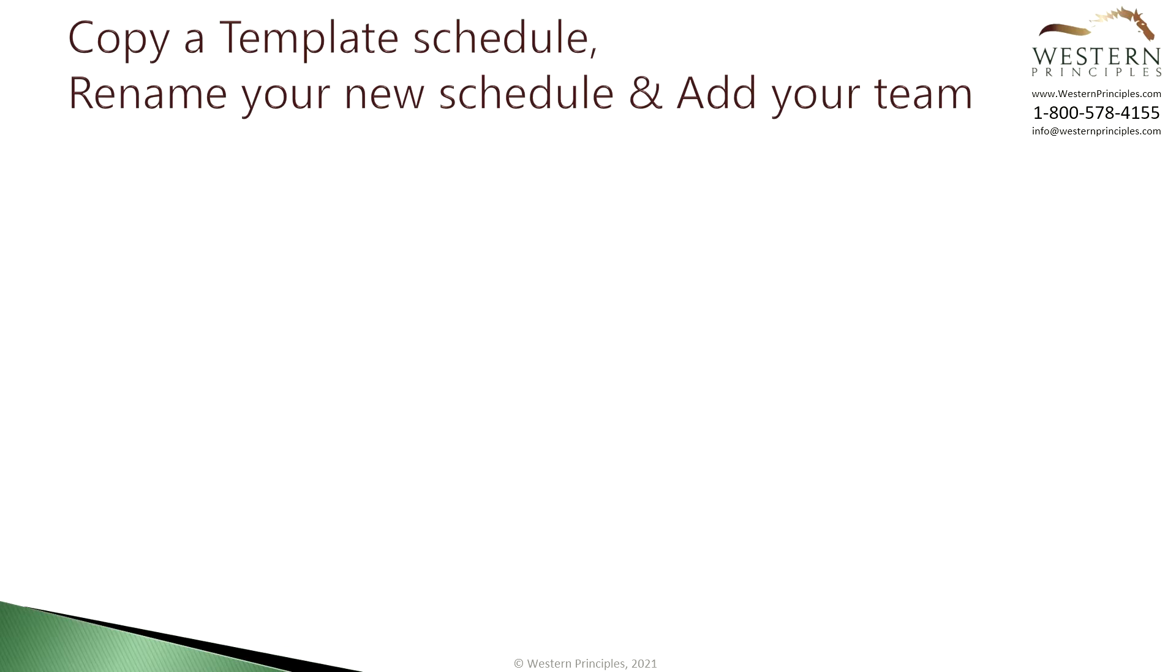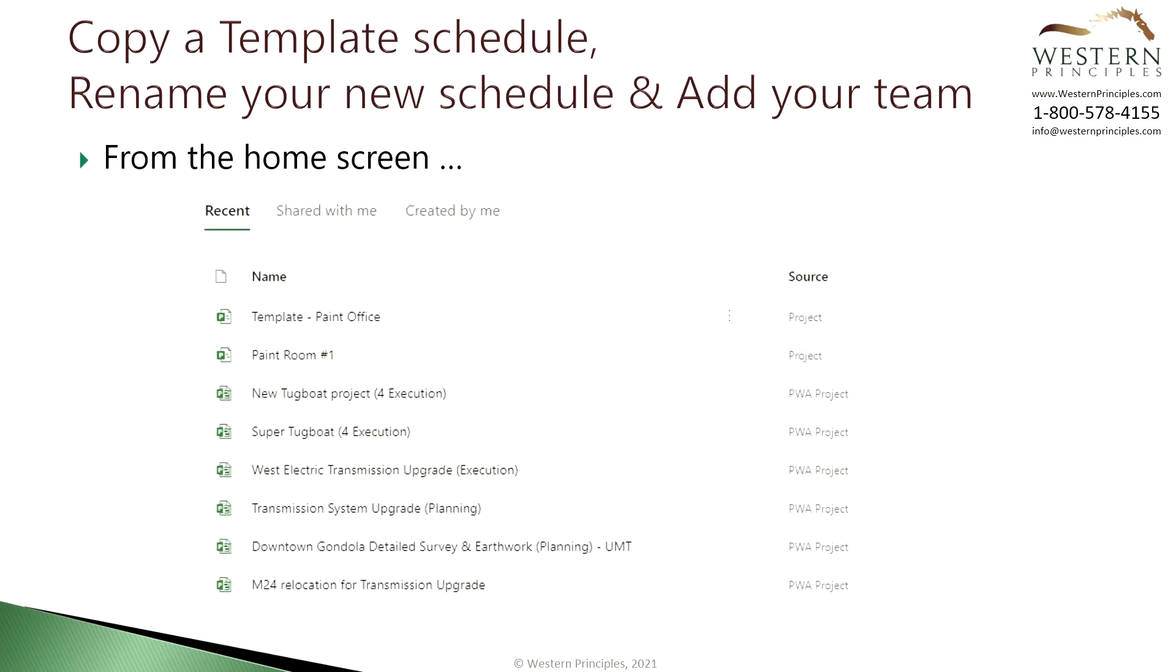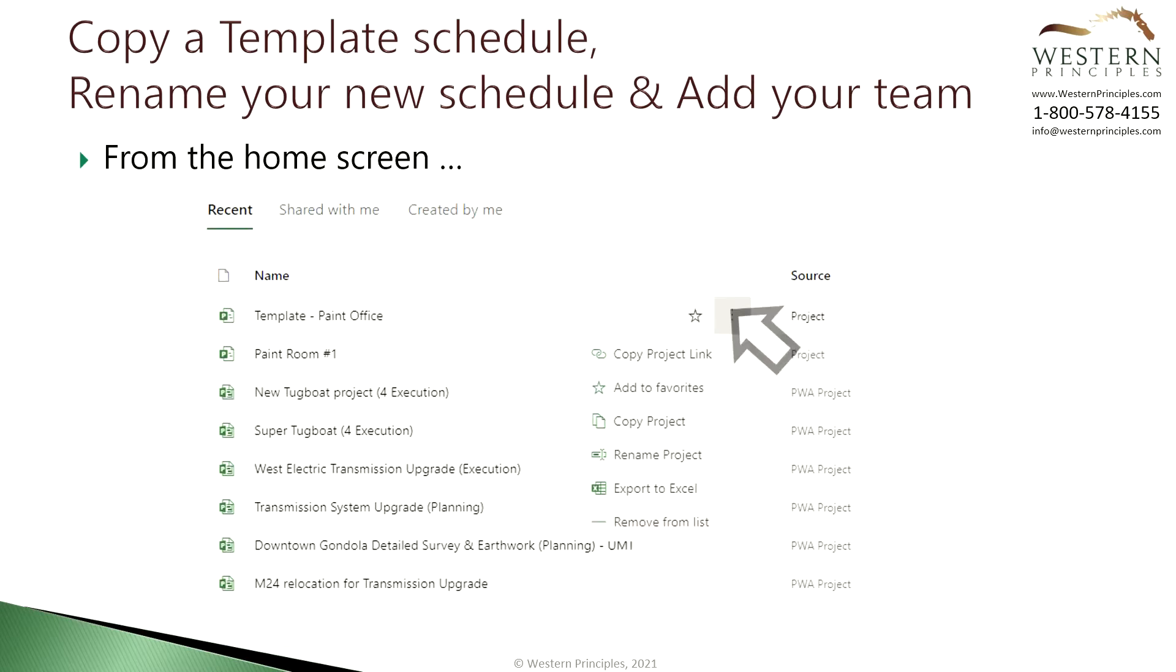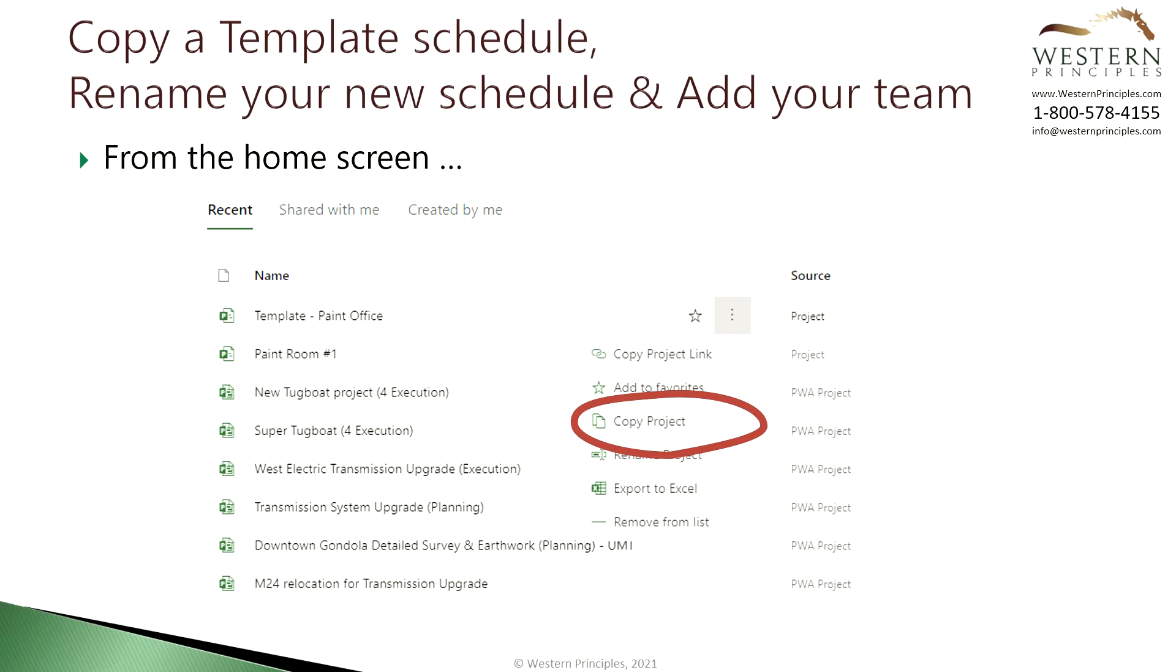To copy a template to a new schedule find the template on your project home and click select more options with the ellipsis menu and then pick copy project from the menu. That will create a new project with the work breakdown structure, tasks, durations and dependencies. Since it's our templated project it won't have any resources or progress in it.